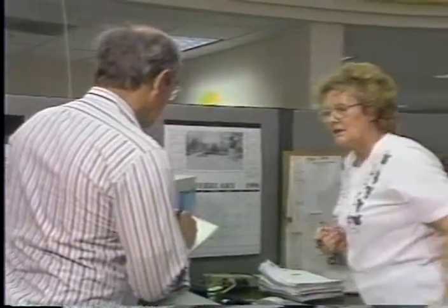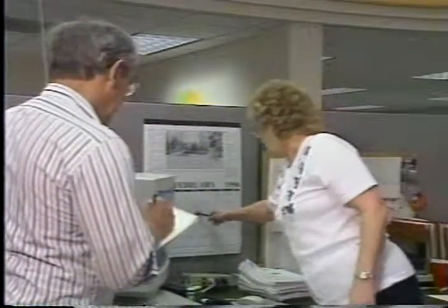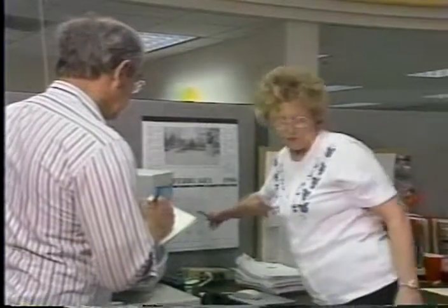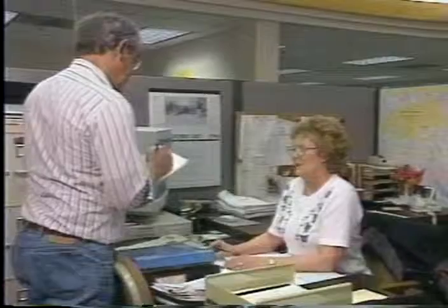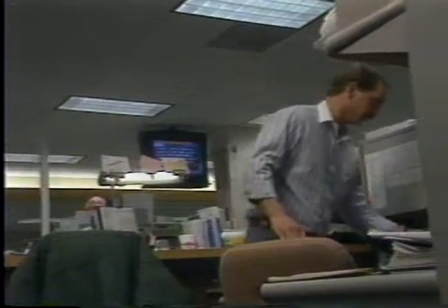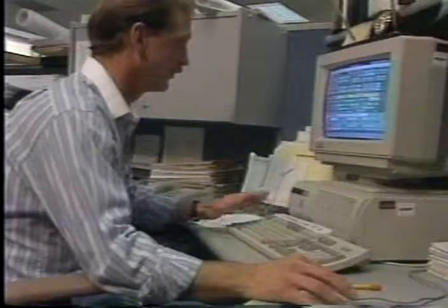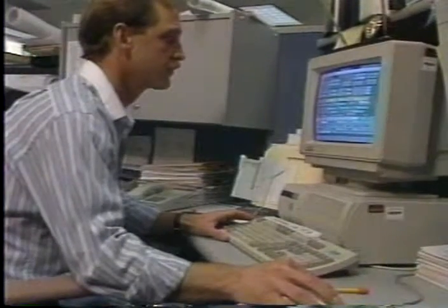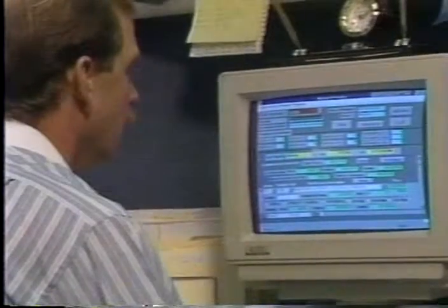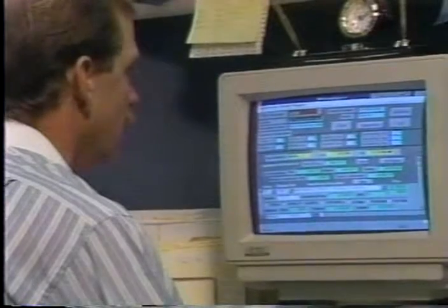The key months should represent the highest and lowest manpower requirements. The skill level requirements represent the ideal mix of employees. Actual staff capabilities may not meet the optimum requirements. Staff as close to the ideal as practical.